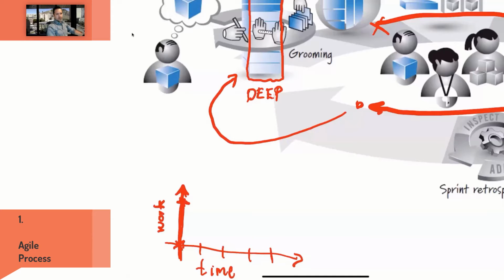Today is my first day of the sprint. What I am going to put there is the work that I need to do, the work to be done. What is the unit to measure work? Number one is story points. So this work here could be story points. Remember that you took some items from the product backlog and you put those items in your sprint backlog. You put items here in the backlog that you're going to use for your sprint.